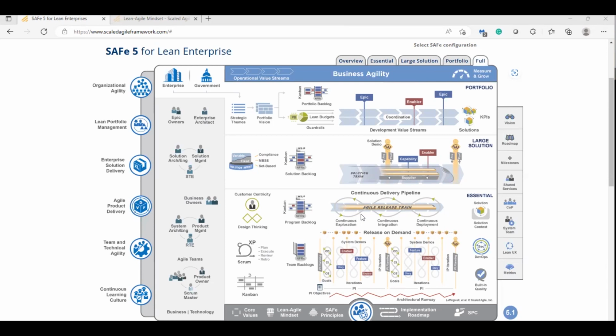From the Scrum, Scaled Agile takes it to the next level that is called PI planning. You plan for 3 months, actually, 5 or 6 iterations. First plan to second plan, what is the difference? Second plan to third plan, what did you learn from the first plan? How are you planning from the second plan? I use the word plan, no, that is called PI planning. First PI planning to second PI planning, what did you learn? Same thing we are doing for a set of trains, set of timeline.